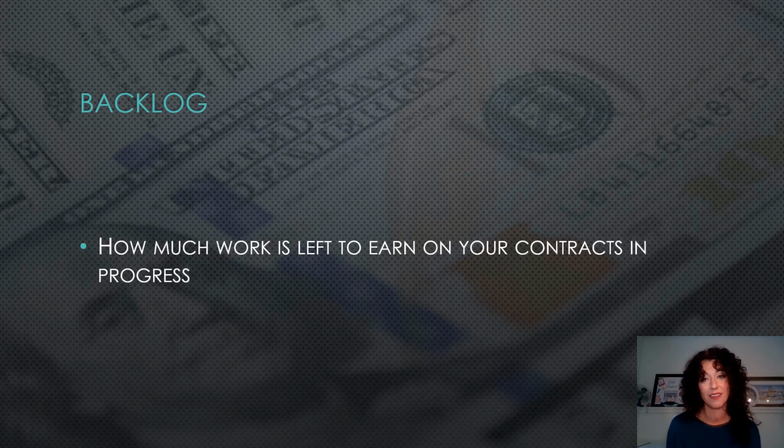or how much left you have in backlog. Backlog then can tell you how much overhead coverage you have already built, and it helps determine break even and how much you need to finish the work. Very important term to understand, and it's very important to understand how to calculate it. I like to use the WIP to calculate backlog, but there's multiple ways to do that. In the WIP class, we do show you how to calculate backlog using a work in progress report. So if that's something that's of interest, it's in there.